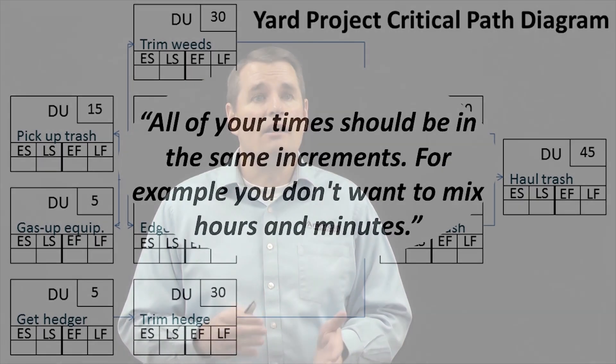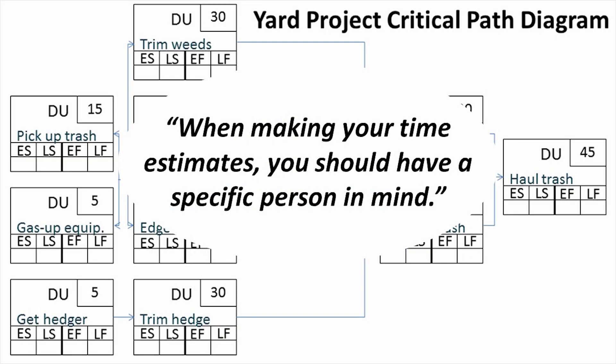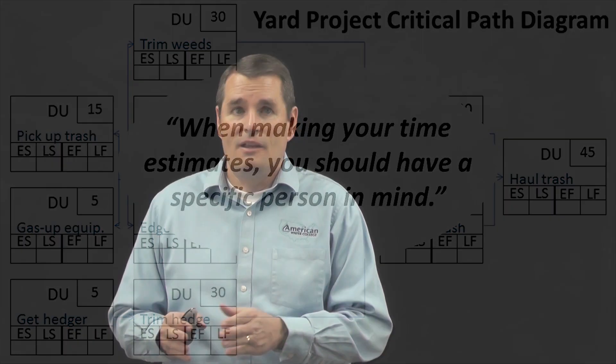Another rule to keep in mind is that all of your times should be in the same increments — for example, you don't want to mix hours and minutes. In our example, I've scheduled everything in minutes, just to prevent confusion. Once it's all diagrammed out, I can add up all of the minutes and then convert to hours to get a total time for this project. You should also keep in mind that when making your time estimates, you should have a specific person in mind. If my teenage son is working with me, he might not work as fast as I do, or he may work faster — your estimates will be more accurate if you know who will be doing the job when you do your estimate.